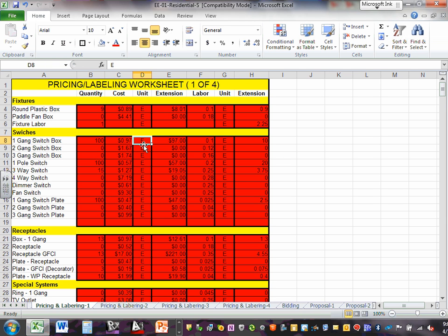Adam, E stands for each one of them. And so you take this number, multiply it by 100. This is what you get, right? That's for this. Then this, the labor. The labor is 0.1 hour. Labors are always given in hours, not seconds. If it's minutes, you have to divide it by 60 to get a decimal. 0.1 hour each, E for each. So you take 0.1, multiply it by 100. That will get you 10 hours.